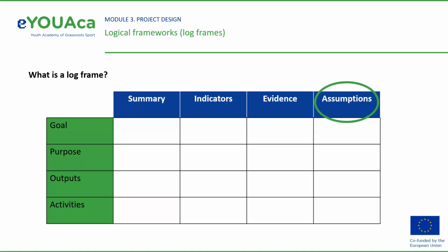Preconditions differ from assumptions in that they must be met before a project can commence. The probability and significance of these conditions being met should be estimated as part of assessing the riskiness of the project. Some will be critical to project success, and others of marginal importance.